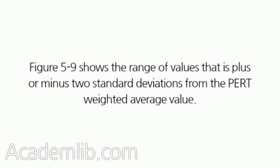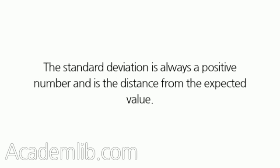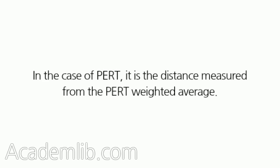Figure 5-9 shows the range of values that is plus or minus 2 standard deviations from the PERT weighted average value. The standard deviation is always a positive number and is the distance from the expected value. In the case of PERT, it is the distance measured from the PERT weighted average.